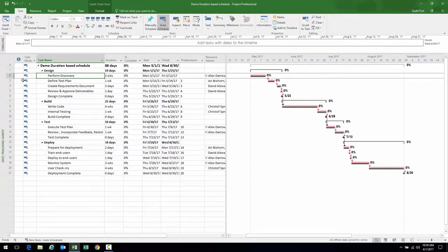The scenario being, I spoke with my team. We were working on stage design, the design stage. And it depends on how often my meetings actually were in this particular case, how often the status meetings. In this case, this task is 2 weeks long. If my status meetings are every week, theoretically, I should only be statusing this one task because it's in 2 weeks in duration. Therefore, if I'm 1 week into this project, hopefully I'm 50% complete.